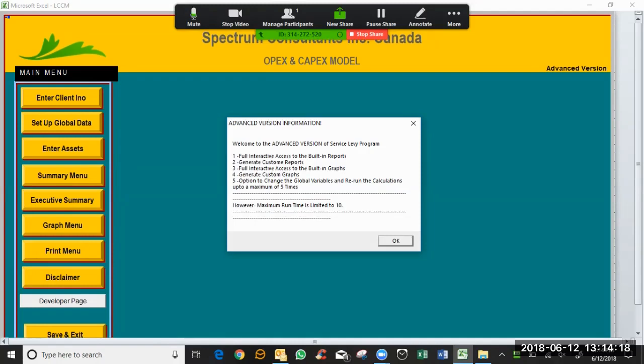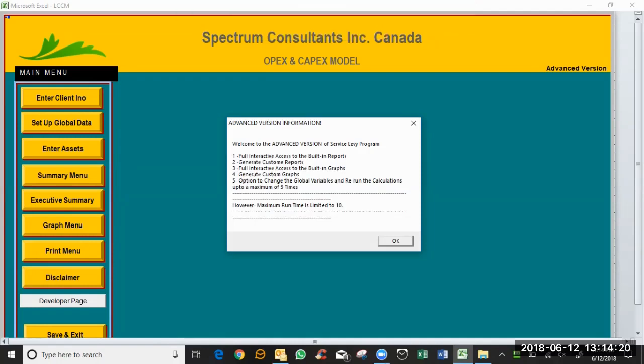At the inception stage, when the project is just at a schematic design stage, you guesstimate the number of assets and the type of the assets, and from there you can build that. The second stage is the post-design stage, when you have a better picture of what assets are being populated into the model, and the third is the post-construction stage, when the assets are physically installed and you know what those assets are. So usually on these three stages.